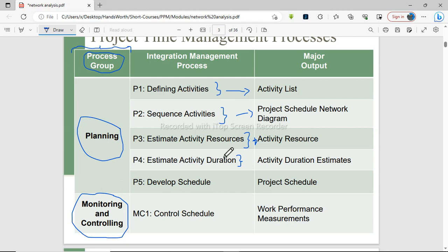Maybe they will say, okay, this pool that you want to construct, how long and how deep will it be? You tell them, and then they'll give you some rough estimates of how long it will take for them to dig that pool. So you will say, under activities, digging, it will take this amount of time, maybe 3 days.